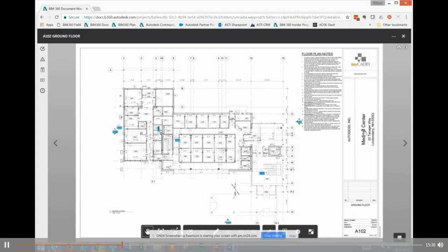Now what they've done is they've taken the sheet name out and they say, we're only going to match off a sheet number. So the sheet number is the same. That's how we're going to match these up and version them, which is actually a really good thing and produces, in my opinion, better results more consistently.